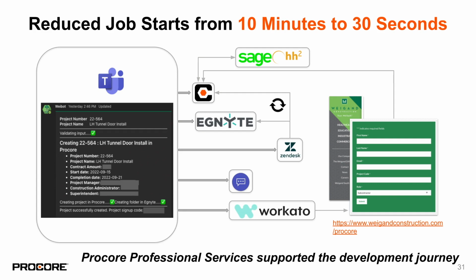And then Workato's doing all this, but lastly, Workato is sitting in the background watching, and one of the weird things we do is if you look down at the very bottom, project successfully created, project sign up code, it's like an 8 or 9 digit code, I forget exactly. It creates this little unique code, and then on our website is a form that we made where you just fill out the form, who you are, what role you want. I'm a subcontractor. You put that code in, and it automatically enrolls you in the job with the right permissions.